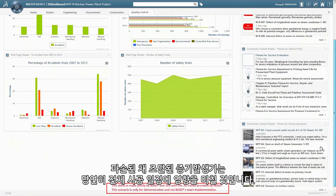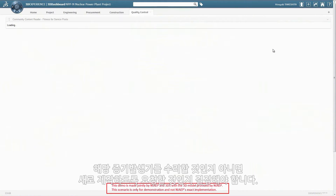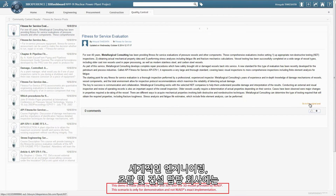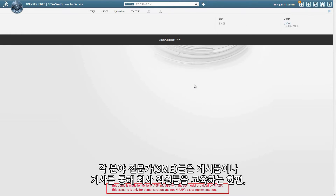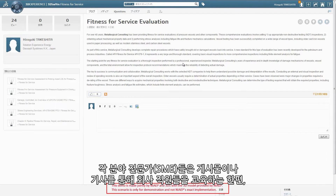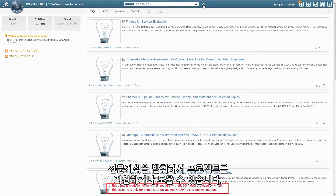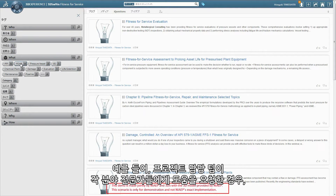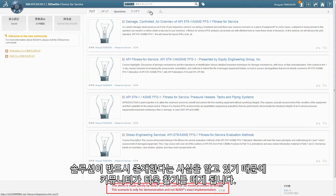The SG being delivered with damages will obviously impact the overall construction schedule. The decision needs to be made whether to repair the SG or to order a new one to be fabricated. Collective knowledge is leveraged from the best experts in the company. World-class engineering, procurement and construction companies have active communities for various subjects. Subject matter experts, SMEs, are expected to contribute and educate members in the company with posts or articles, and also to support any project with their expertise. They are evaluated based on their contributions. If a project requests help from subject matter experts, they are obliged to answer in 2 days, so the community becomes more active.